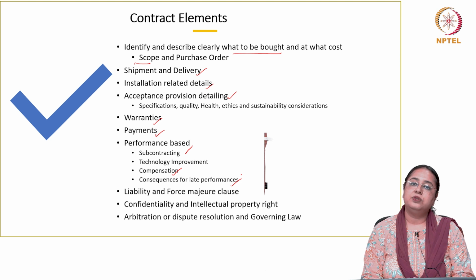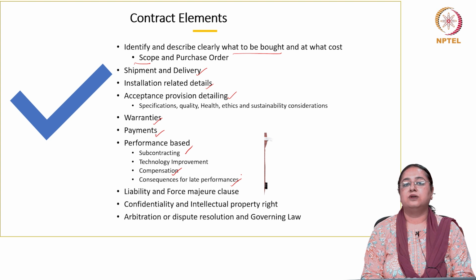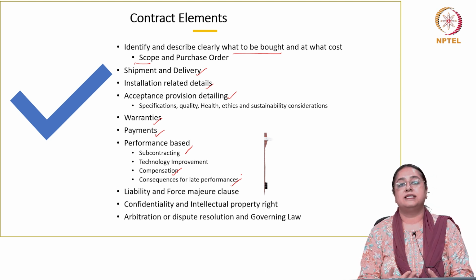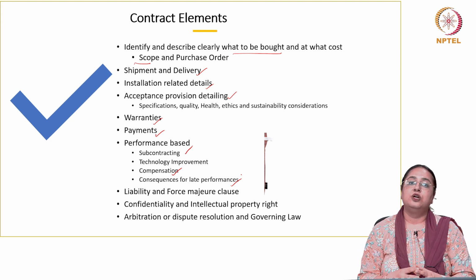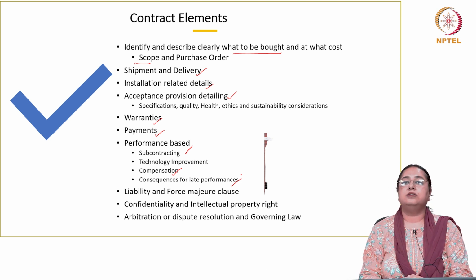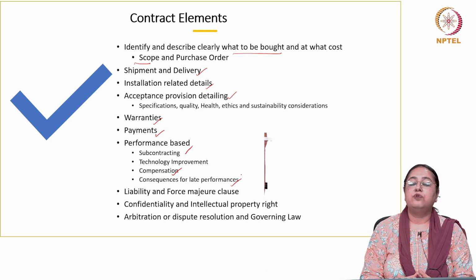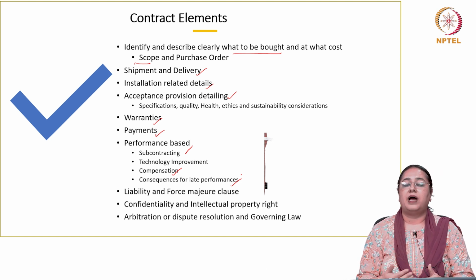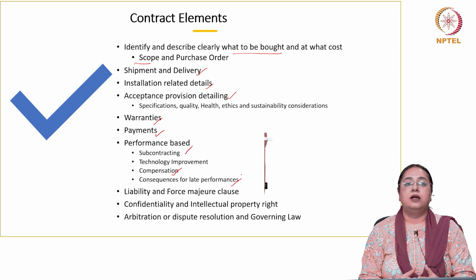At the same time, this is very important these days. We have just experienced a very disastrous situation which happens once in 100 years, right? The COVID situation has led companies to become more conscious and more inclusive of this force majeure clause, right? If something goes wrong, an unforeseen activity happens which would prevent the supplier from performing as expected, then this force majeure clause will be enforced.